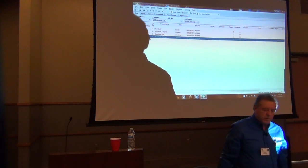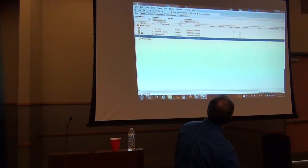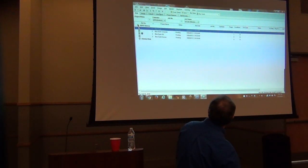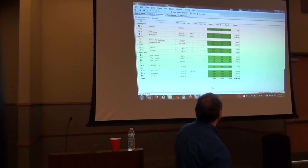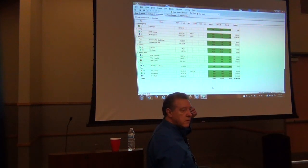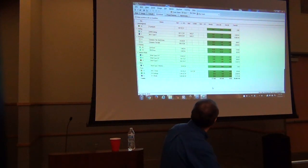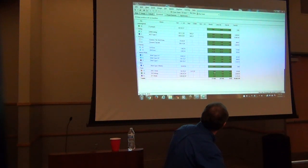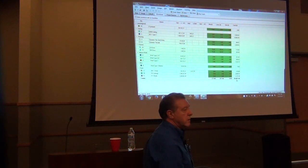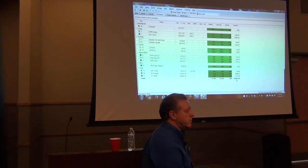And before I go forward, one thing I failed to show you in the first one, let's go back there for just a second. A lot of people say, what in the world is this worksheet? It's nothing more than a live Excel worksheet. It's unit cost. Now I'm back in the original, and I'm like, okay, I need to throw a number in here real quick. Well, I've got some fairly reliable unit costs in here. Material, labor, and or sub. I dropped a few in here. I'm at $26,967 unit cost. So if they want a number right now, there's a pretty good ballpark figure.